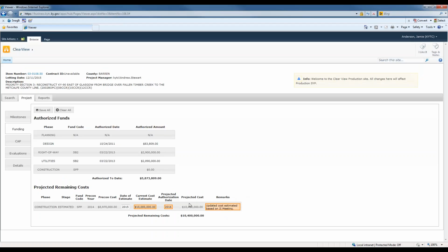You'll notice the projected cost changed to 10,400,000. The cost will automatically escalate based on the projected authorization date, so that's why that changed. Then you would click Save. So I'm just going to clear that.